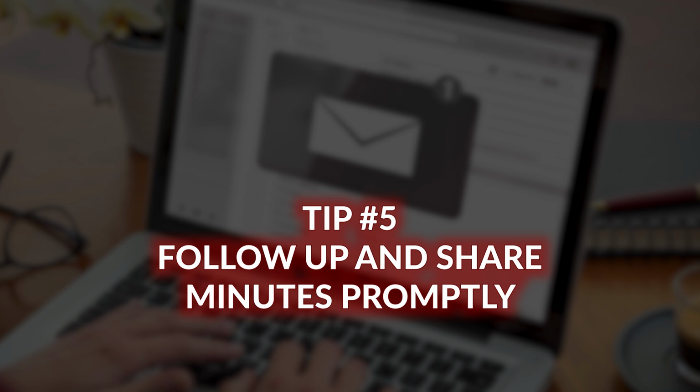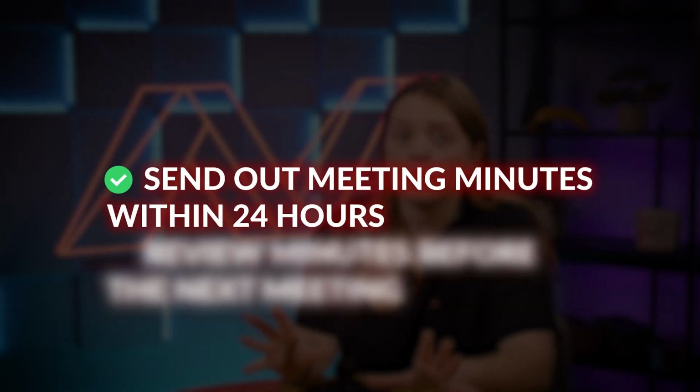Follow up and share minutes promptly. Meeting minutes are only effective if they lead to action. To make sure your efforts don't go to waste, follow these steps. Share the minutes promptly. Send them out within 24 hours of the meeting. This ensures everyone has a clear understanding of their responsibilities while the discussion is still fresh.